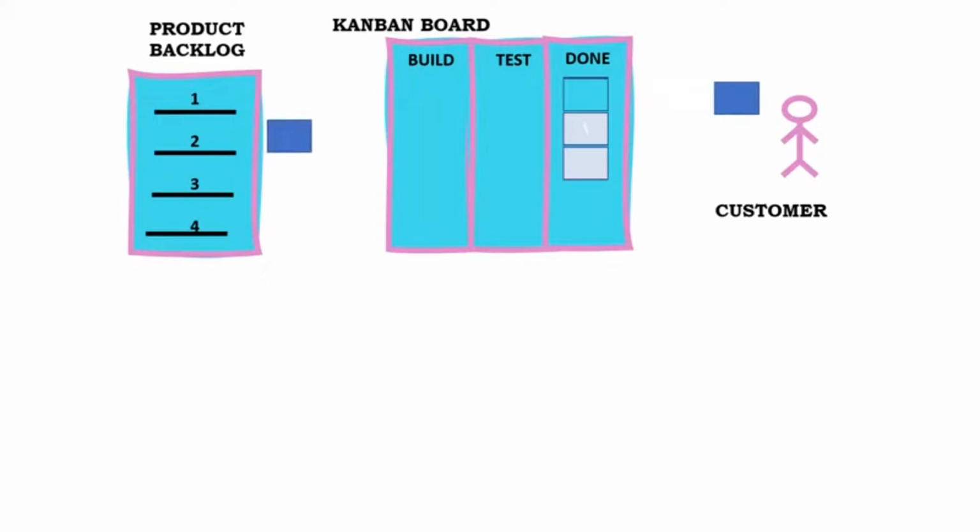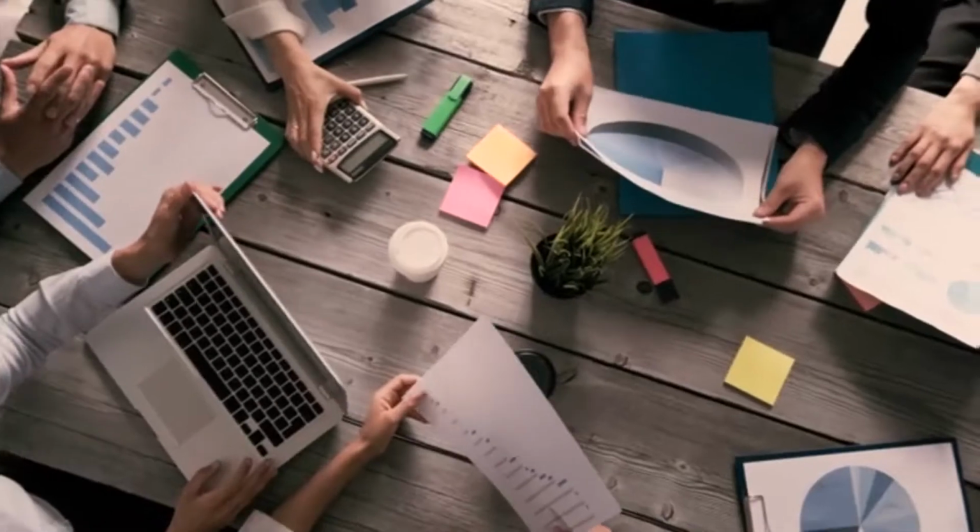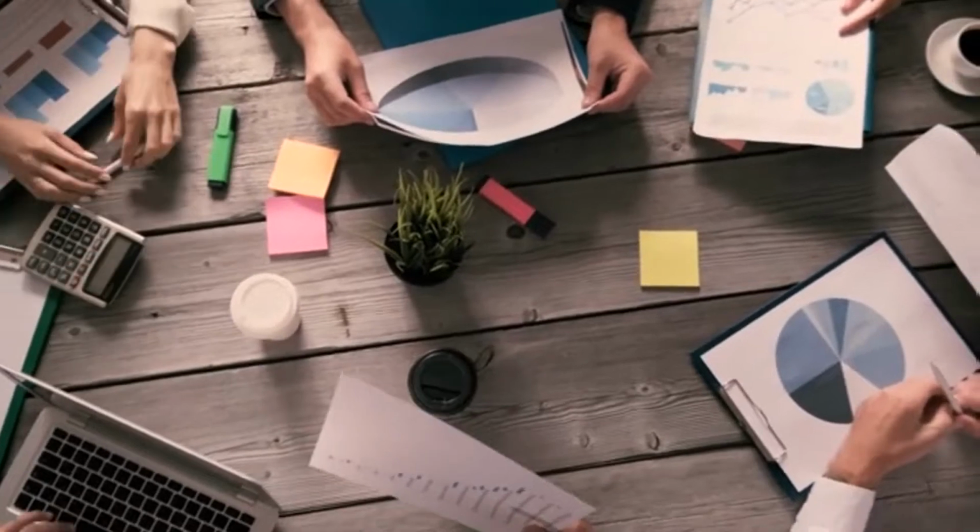What do we need to finish as a team? Are there any bottlenecks or blockers to the flow of work? One of the anti-patterns typically seen in stand-ups is they become status meetings. Another anti-pattern typically seen in stand-ups is that the team begins to solve problems as they become apparent. Stand-ups are for realizing there are problems, not for solving them.